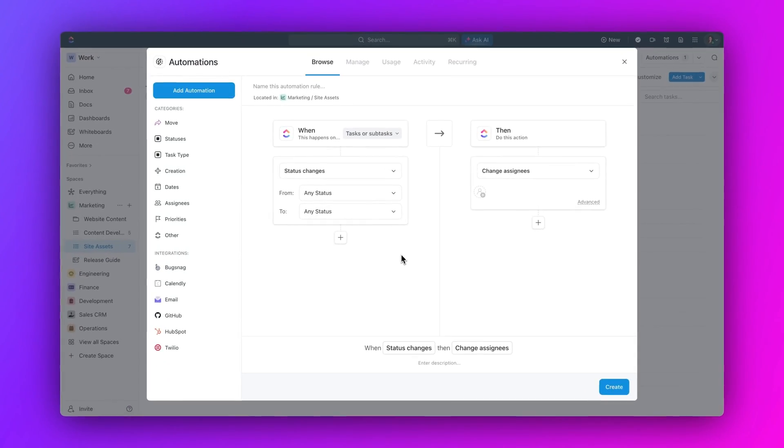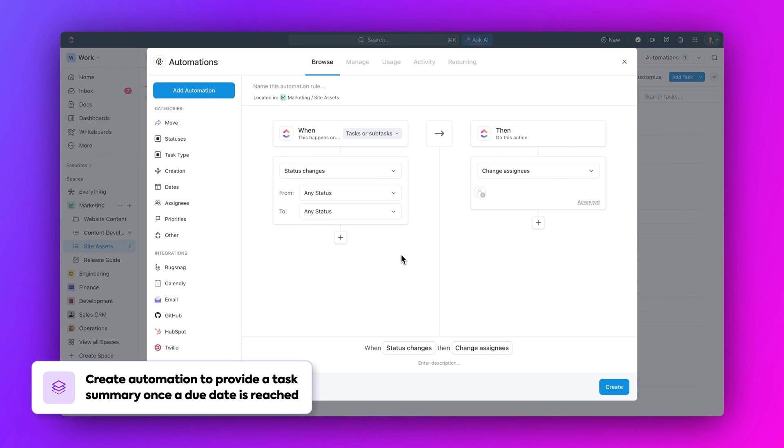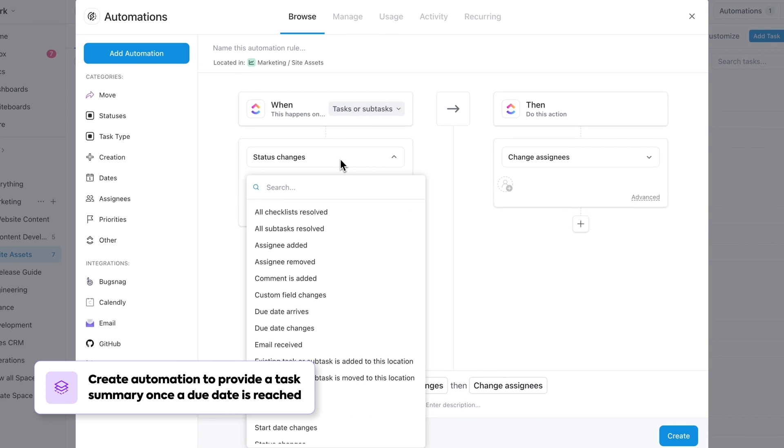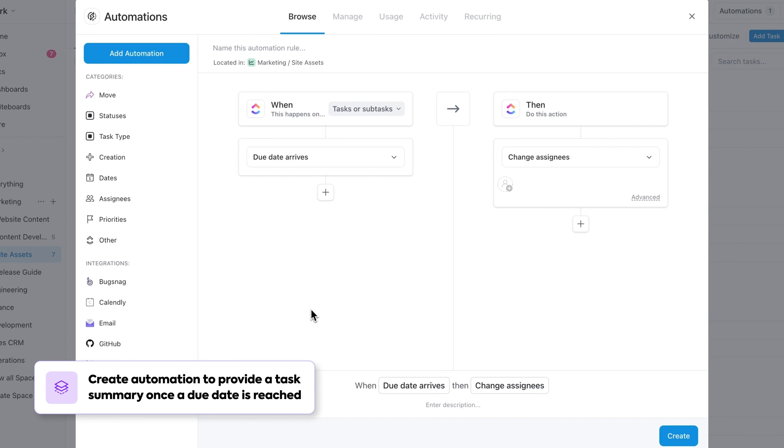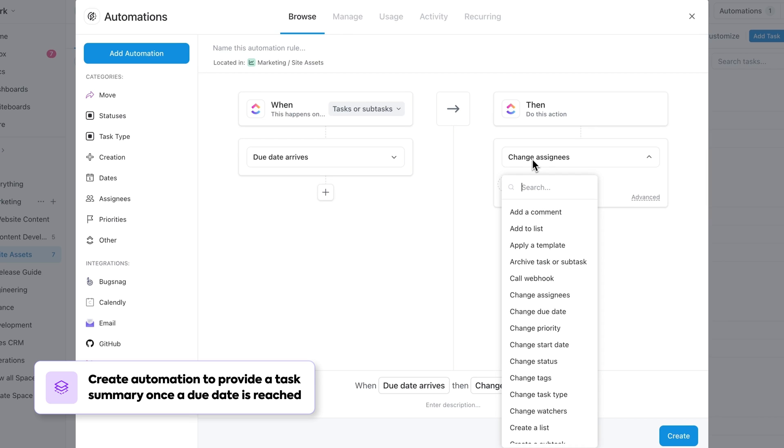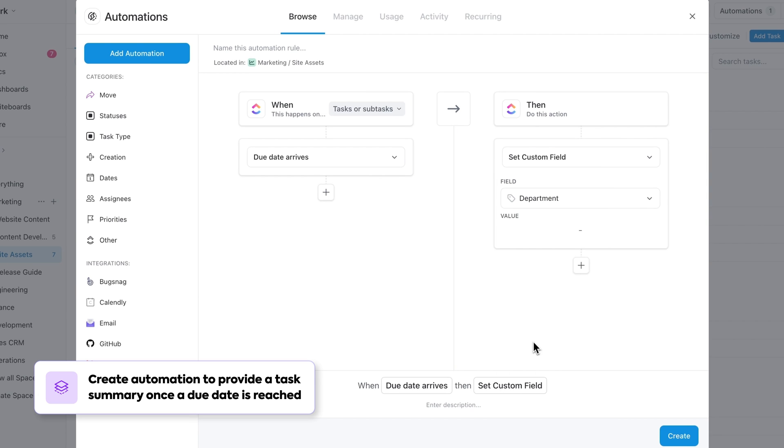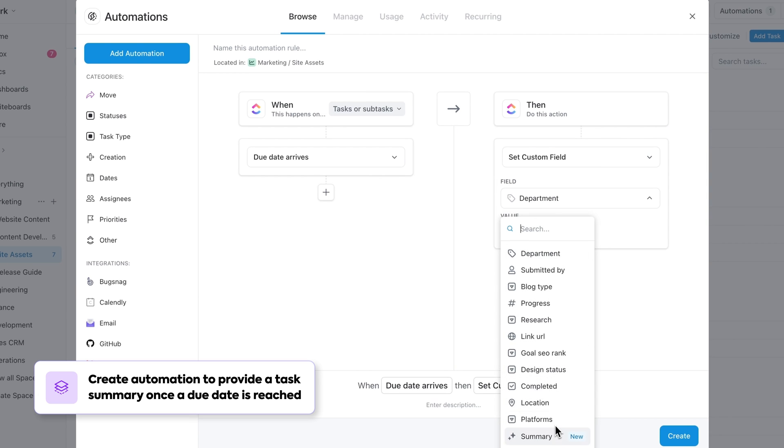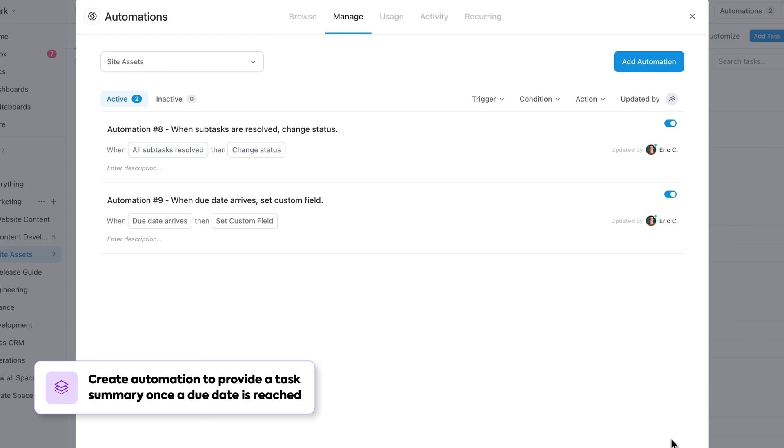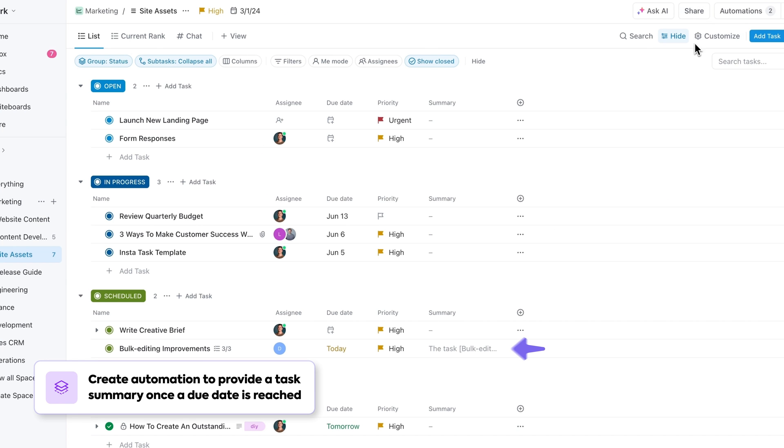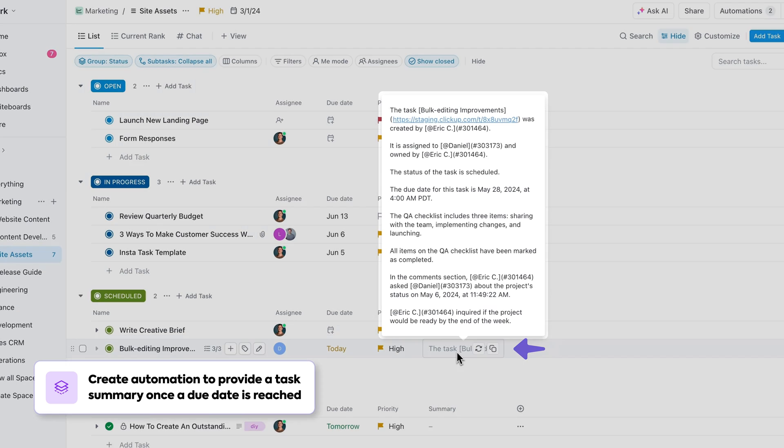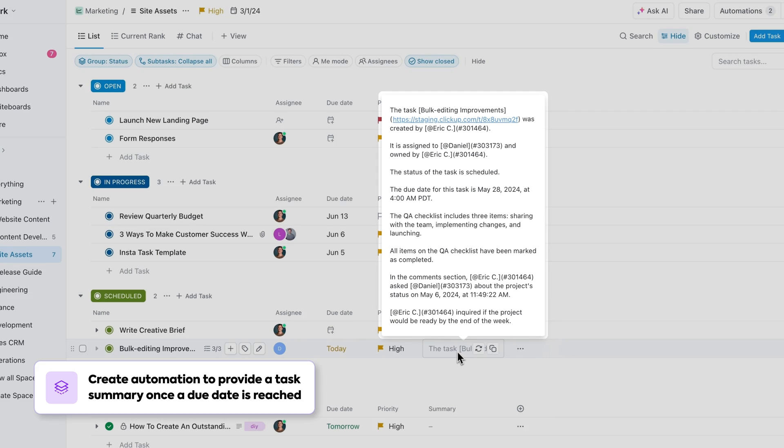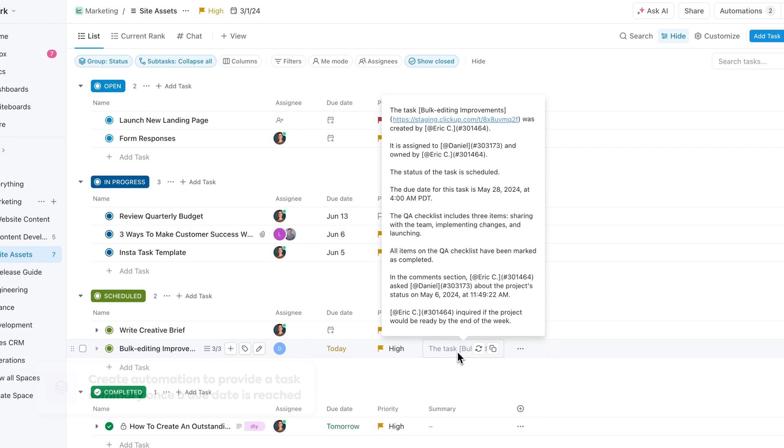Here's another example. Let's say you want to create an automation to provide a task summary as soon as any task in a project reaches its due date. You can set this up by setting your trigger to when due date arrives, and setting your action to set custom field, and selecting the summary option. So now, whenever a task due date arrives, you'll get a tight summary of all the progress within that task.